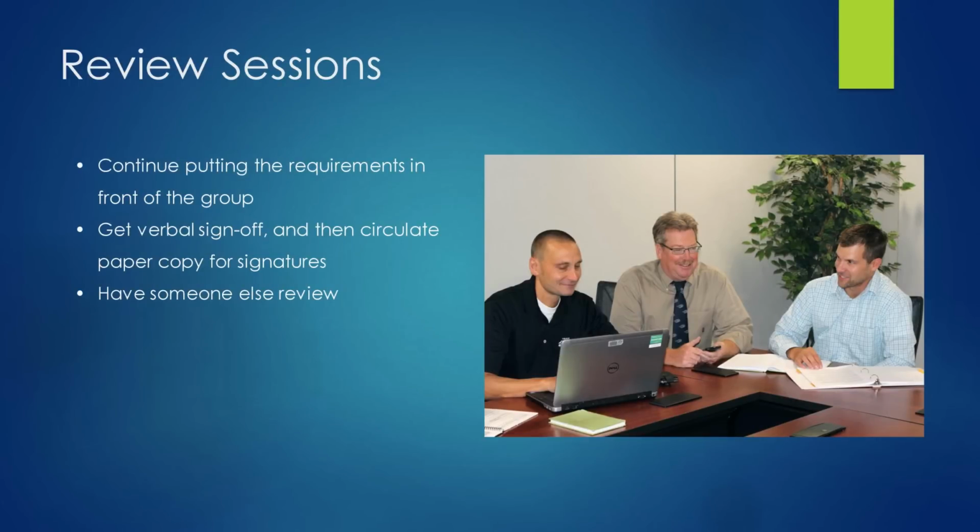Review sessions. Continue putting the requirements in front of the project stakeholders to review, and don't underestimate the amount of time it can take a group to reach agreement around all of the requirements of a project. It's not uncommon that discussions for a small project can take a couple of weeks.